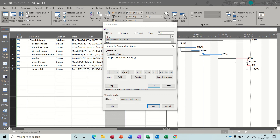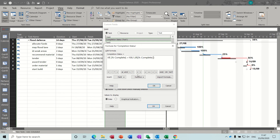Now I need to do another if statement. Normally you do the negative — what to do if it's false — but you can do another IIF instead. So IIF, open the bracket, go get your field again under number — so if percentage complete is greater than or equal to 75, comma, that's going to be a 2. Comma, and then another if statement: IIF, open the bracket.